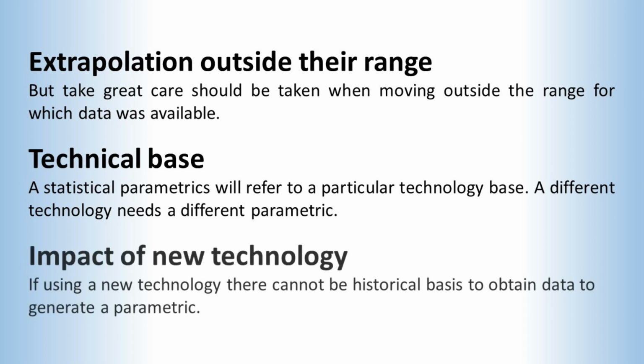A related problem, and the worst limitation of using parametrics, is the one we've discussed with the serpent engine on the Scorpion. Parametrics cannot be used for new technology. A statistically derived parametric will of course relate to the level of technology and methods of design and construction used in the examples that provided the data used to derive the relation in the first place. But often in a new system, or simply in a new approach, it is the new technology that's the key feature, and this will have to be evaluated by other means.